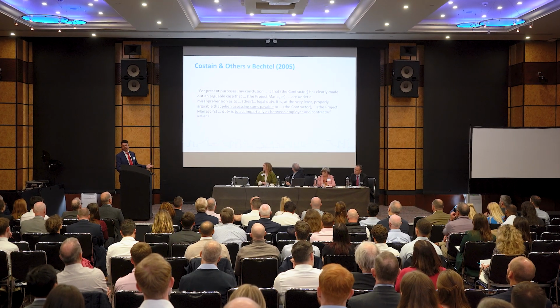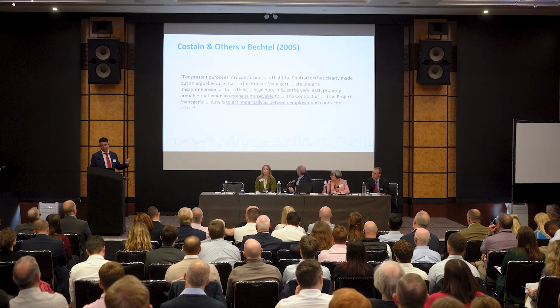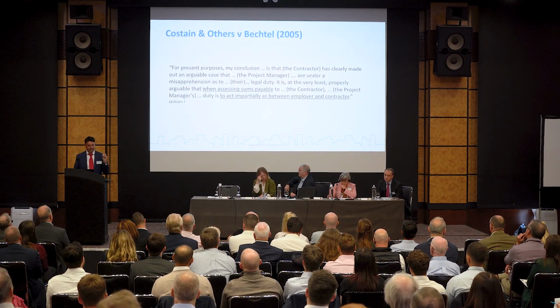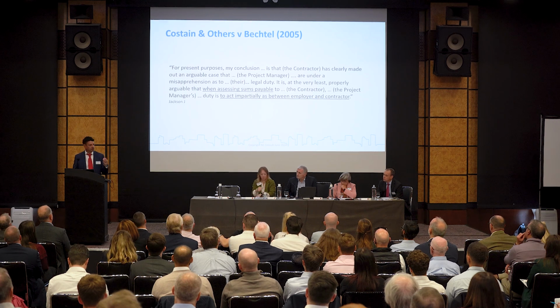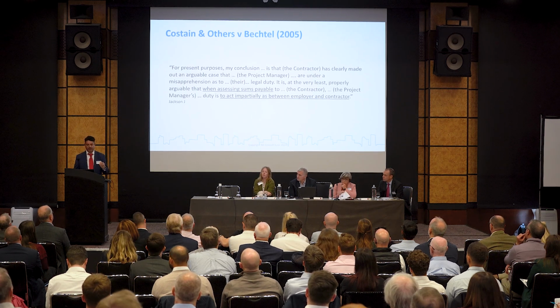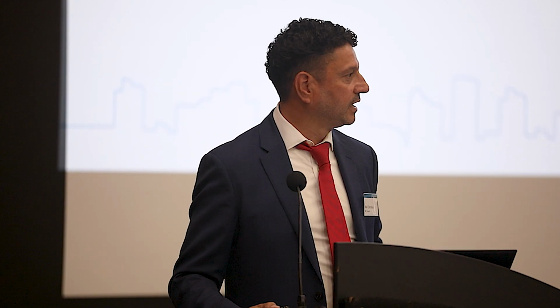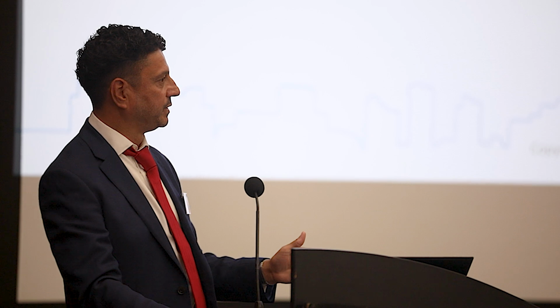I don't think it needs to be, because I think the support is now confirming that the project manager, when assessing sums payable, has a duty to act impartially between the two parties. Impartially. So as project manager, when you're assessing things, you are not there on behalf of the client, with the client's hat on. You are independent, like an adjudicator would be, like an arbitrator would be, or like a judge.